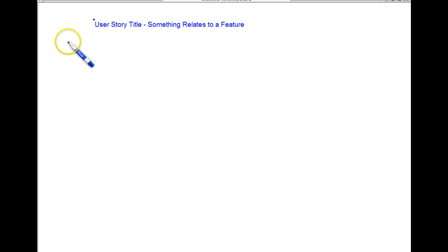Then I went into a little bit of detail about what the user story structure is. What should we be looking for there? The basic structure that I related to people is how it is usually written: as a, and then what goes next is the role. So as a supervisor, as a user, as a customer, etc., as a role, I want, and this would be the feature. So as a role, I want this feature so that there is this benefit.